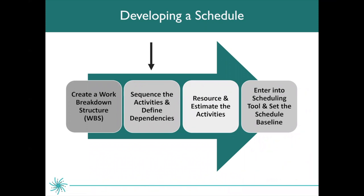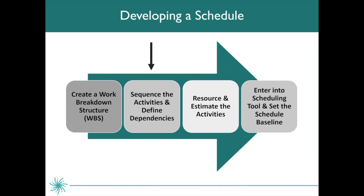Once you have your work breakdown structure created, you want to sequence the activities and define dependencies. Before I show you what this looks like, I want to go through a little bit of terminology. A predecessor is an activity that precedes another activity — this task must be accomplished before the next task can begin. That's called a predecessor. A successor is the one that comes second, what follows as far as the work. An activity can have several predecessors and it can also have several successors.